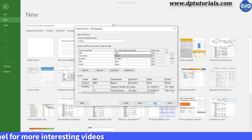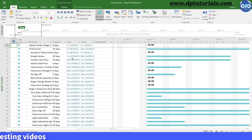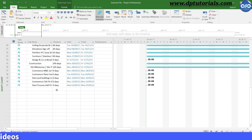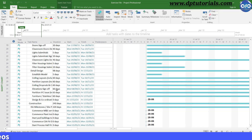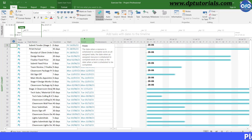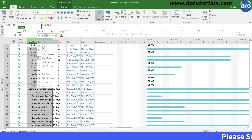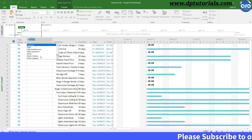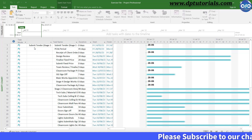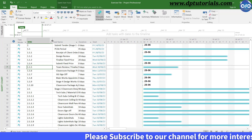If it looks correct as per your requirement, just click Finish. Now you can see that the information has been imported from Excel into MS Project. We have got task names, duration, and the start and finish dates. If you insert a column called WBS just next to the task name, you can see the exact numbering as seen in your Excel file.